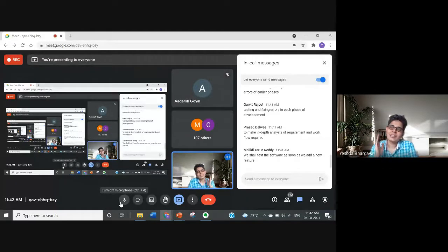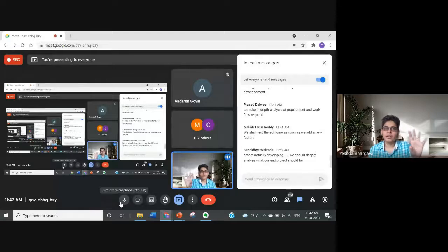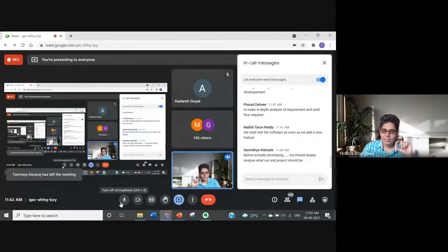So at each iteration of your software development, obviously, suppose you have planned out your software development in a series of stages, and you are on the first stage. You discuss what is to be done. After laying out a plan, you ideally discuss with your team members before implementing. After implementing, you go back to your specifications and see whether the developed prototype is actually matching the requirements that were specified in that particular stage, and then you test it. Only after all of you are convinced that it is good to go to the next stage, then you move on to the next stage.